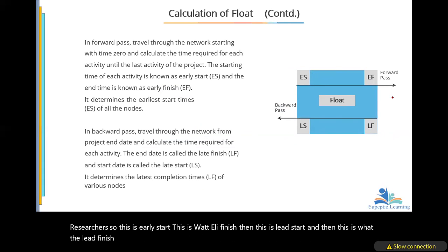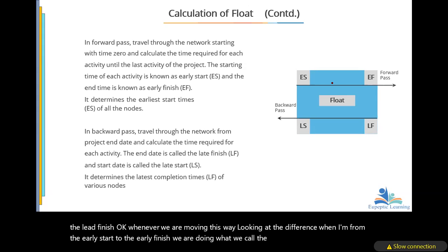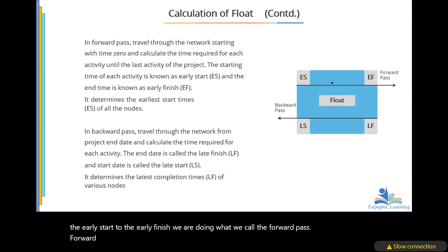Whenever we are moving this way, looking at the difference from the early start to the early finish, we are doing what we call the forward pass. Forward pass, yes. We want to determine the earliest start times of the activities on the node.